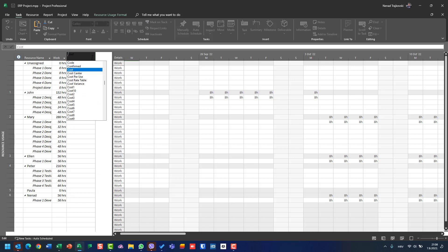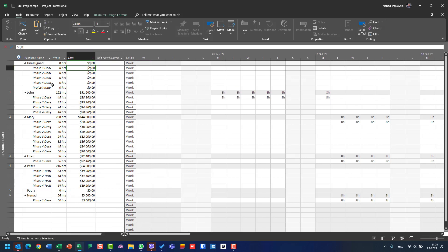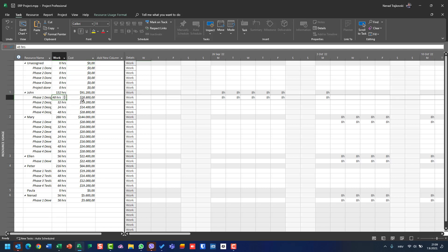Let's put Cost. I will see that John is supposed to spend, in total, 152 hours, and his total cost for all work on all tasks is going to be $91,200, compounded from four tasks, each with different work and different cost.